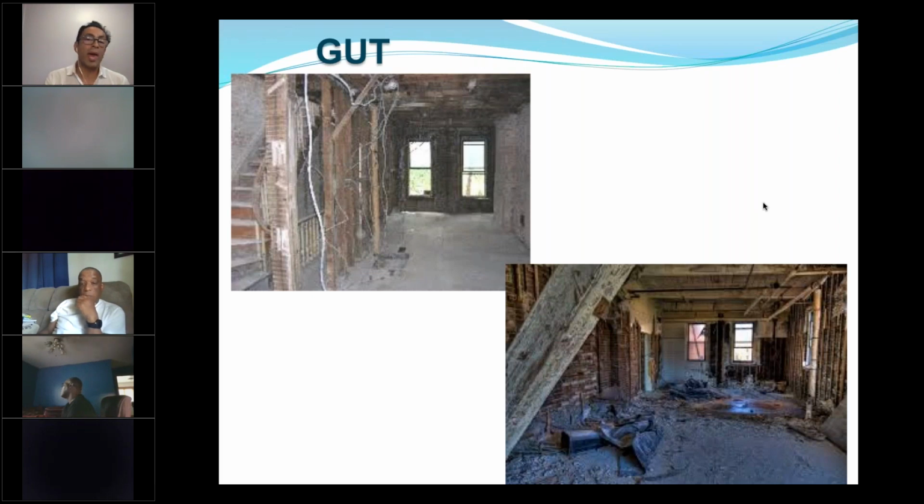Unless, friends, you have a construction background or a construction company, please do not take these type of projects, because there's going to be not only one kind of worms, there's going to be 100 kinds of worms on the flooring, HVAC, electric, plumbing. Not only that, but let me tell you, when you take on these type of projects, let's say for plumbing, let's talk about plumbing. You're going to need to do what's called rough plumbing, okay? And you're going to have an inspection for the rough plumbing.